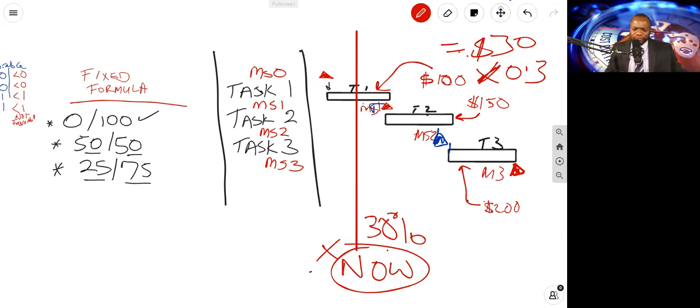So what are the advantages? The DOE has furnished us with some of the advantages of this method. So the advantage of the subjective percent complete method, earned value is based on the CAM's assessment of the work packages, the work package progress, or the task progress. Detailed planning at the milestone level is not required. So we just look at that task, assess it, and that's it. The disadvantage is the customer satisfaction may be low due to the subjectiveness involved and the lack of detailed planning. I mean, anyone could throw out a number. However, CAMs are required to provide the customer with their assessment methodology.